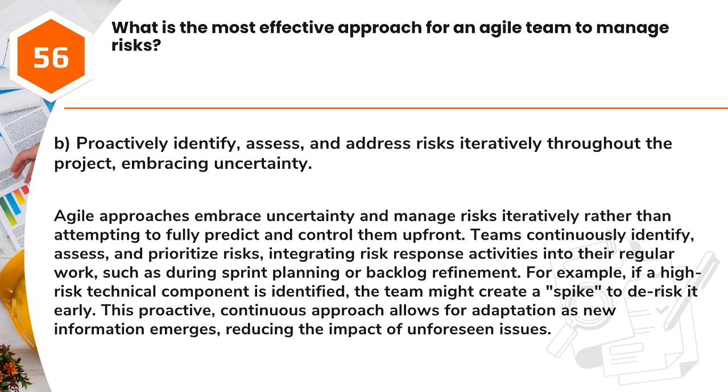or backlog refinement. For example, if a high-risk technical component is identified, the team might create a spike to de-risk it early. This proactive, continuous approach allows for adaptation as new information emerges, reducing the impact of unforeseen issues.